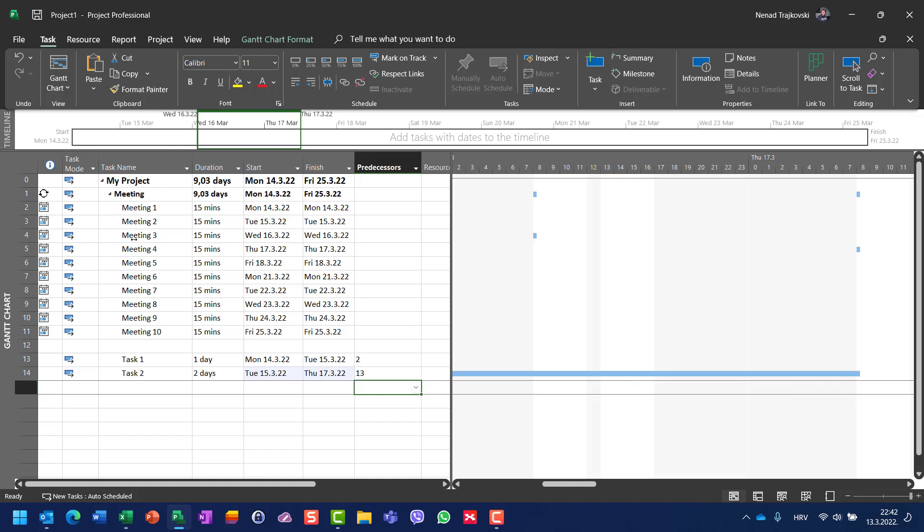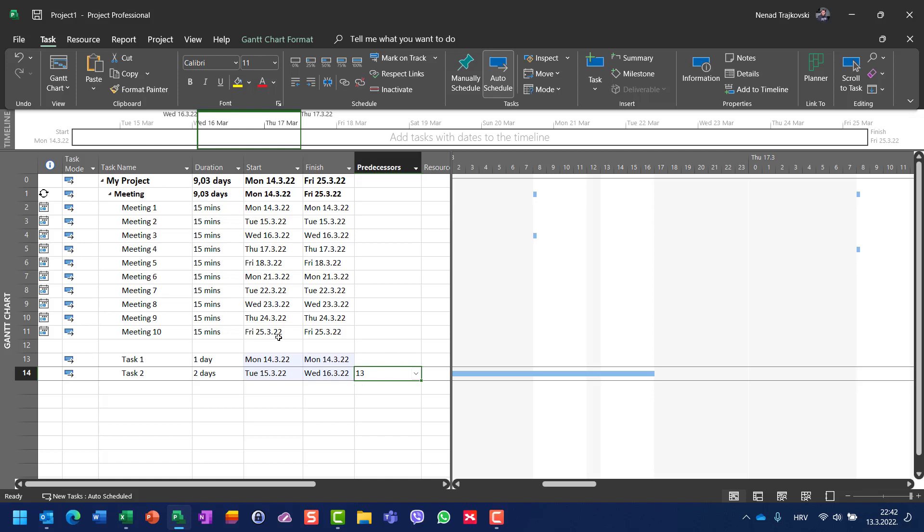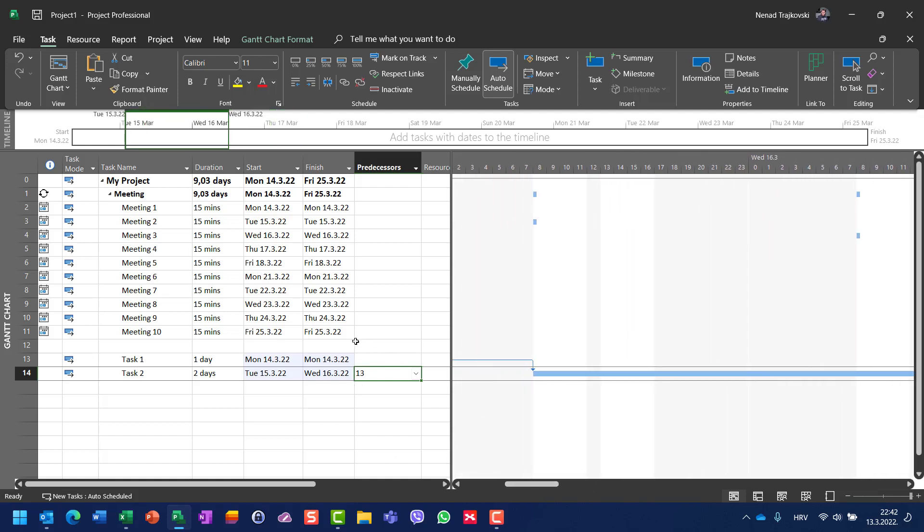When I have short meetings daily, I do next thing—a couple of things. I have a couple variations. Either I am not putting them at all in my project, or if I want to see those meetings, I don't put predecessor. I do not connect my tasks with those meetings.